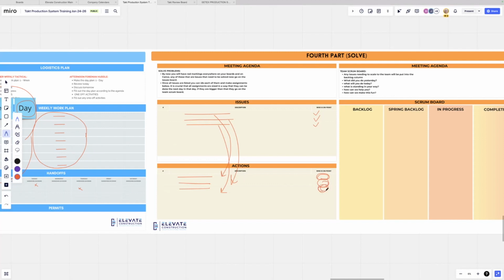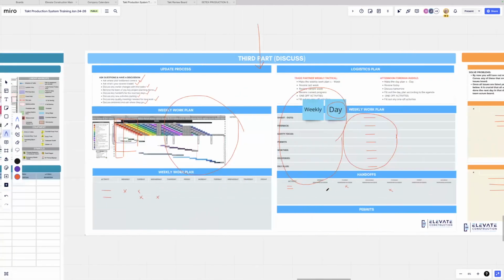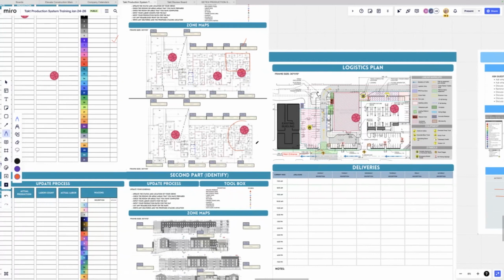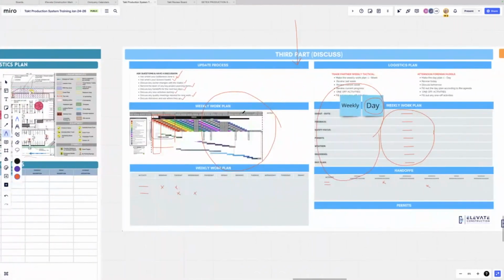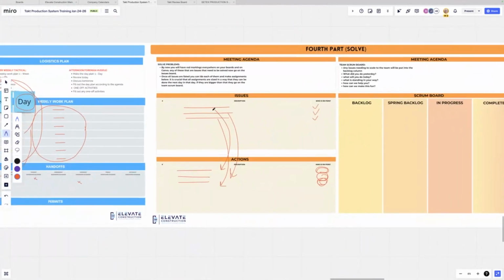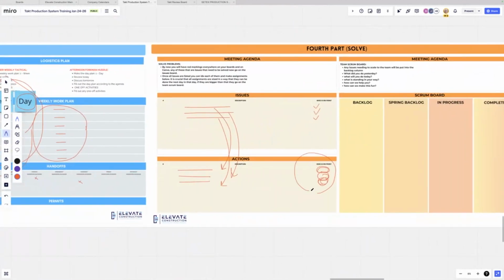That means if I'm a superintendent or a site manager, I would want every one of my major issues to be assigned to my field engineer, project engineer, PM, the foreman for the specific trade, or somebody. Everybody is leaving this meeting. We know where our issues are. We know what our weekly and our daily plan is, right? And we know what our issues are, and we know who's on point and who's going to take care of it tomorrow or throughout the week.